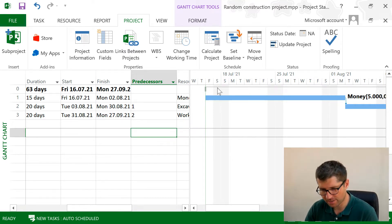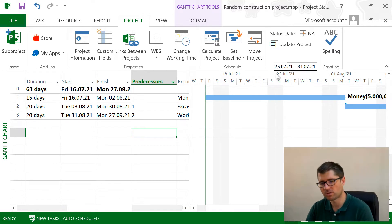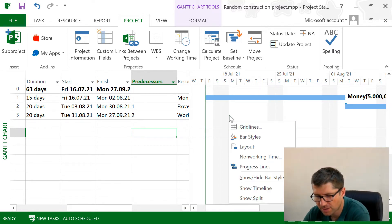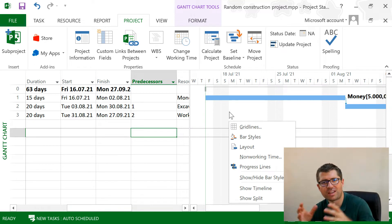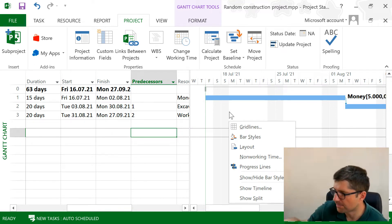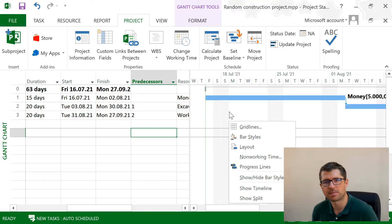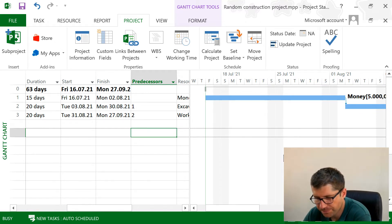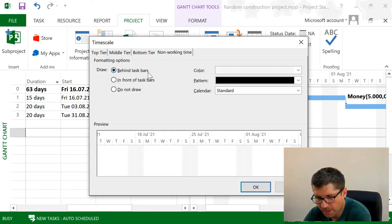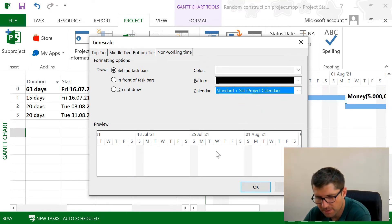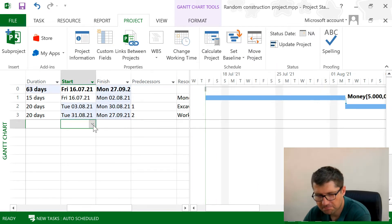But the Gantt still shows me that Saturday is a day off. So to do this, I have to just right-click here and make sure that only Sunday is displayed as a day off. I just have to go into Non-Working Time and change the calendar here to Standard Plus Saturday.